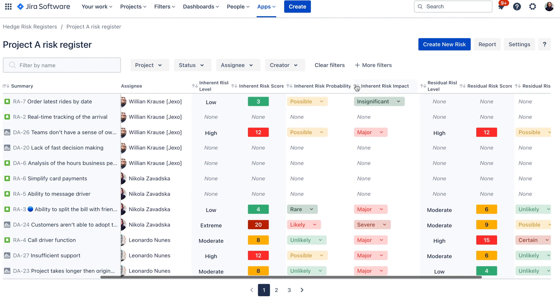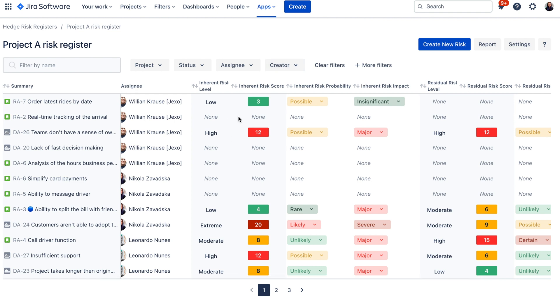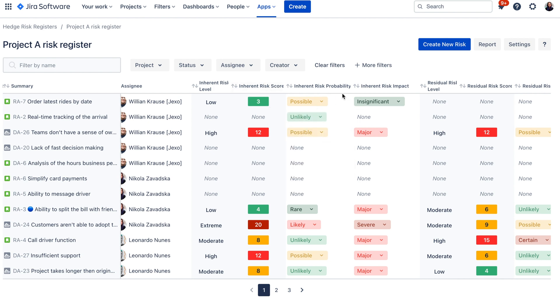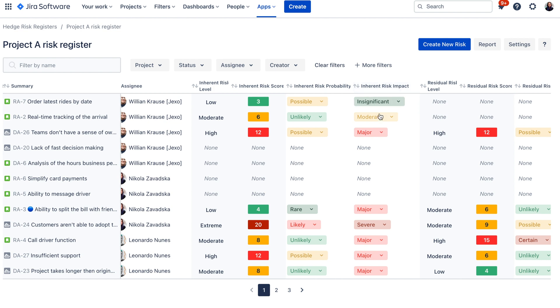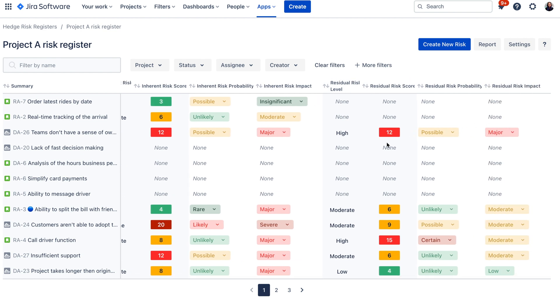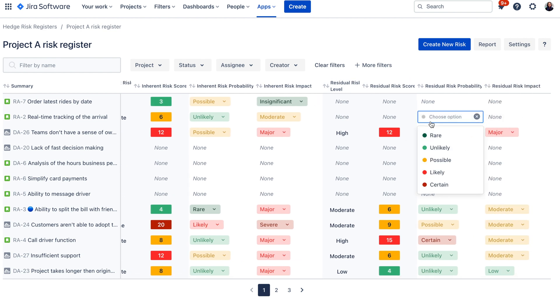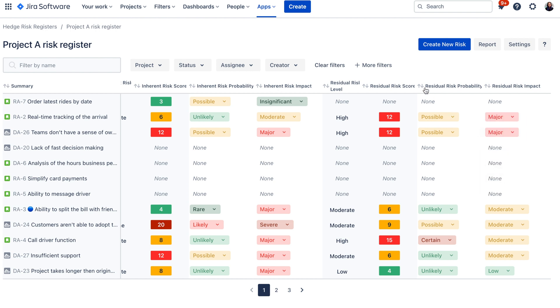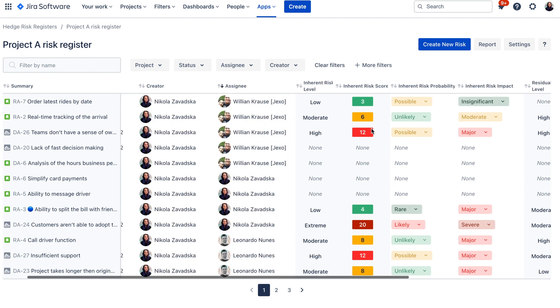On this side over here you can see the risk levels and the risk score and factors or the metrics that are contributing to this risk score. So here you can select the values for your risk metrics so for example risk probability is unlikely and risk impact is moderate for this particular risk and then you can see the risk score is automatically calculated together with the risk level. In this case I am assigning inherent and residual risk here so if I want to assign residual risk I can do it on this side over here and the same thing the residual risk score will be automatically calculated together with the risk level.